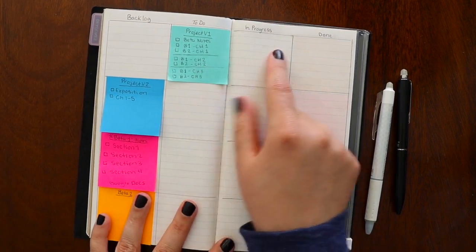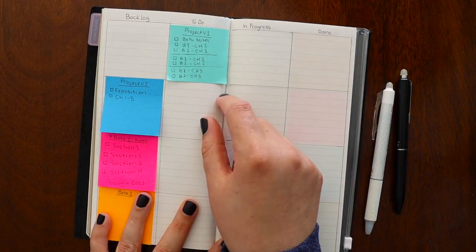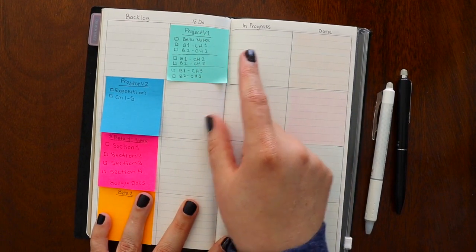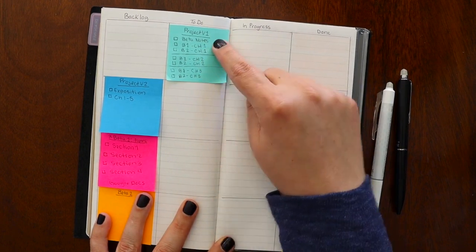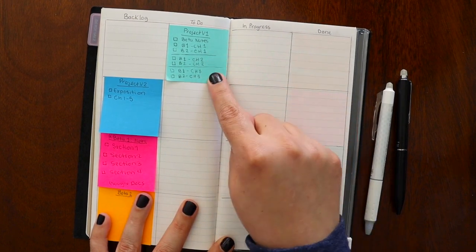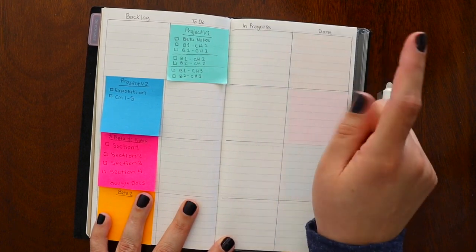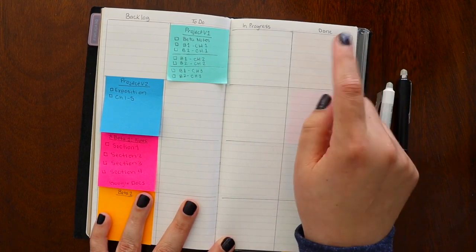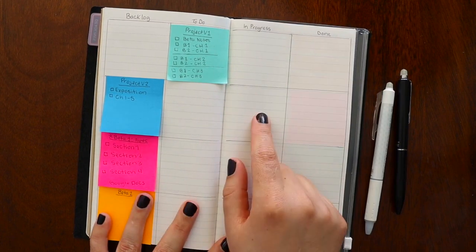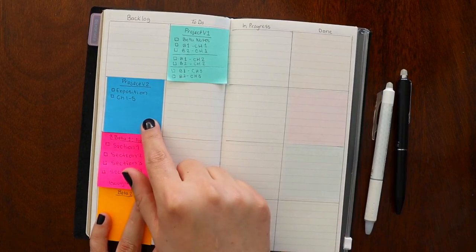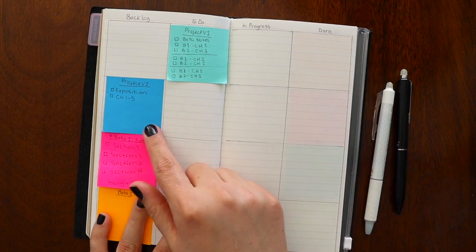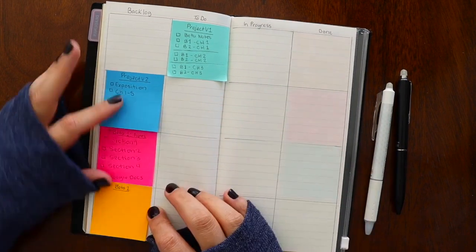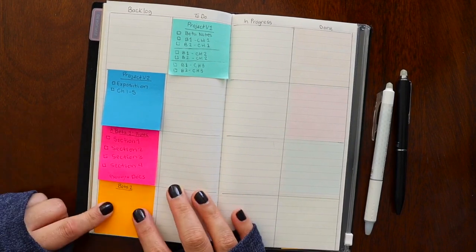Once I get over here into progress and I've done all of these things, I will take the same color of post-it and put another one here and start with, instead of right here, I'd put chapter 4, 5, and 6 and just do the same thing until it's completely done and I've gone through all my chapters and I can put it in done. The same for this sticky note. Once I go into progress and I'm done with the exposition and I move on to the next thing, I will make a new sticky note and keep it in progress.